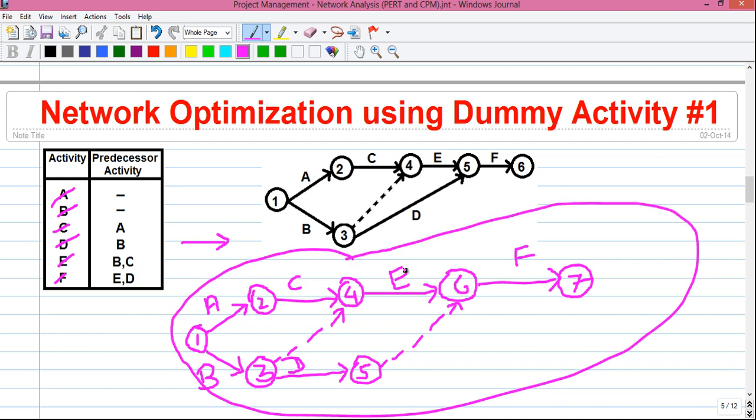Now we will do some optimization to it. Instead of drawing activity D this way at event 5 and then connecting it with dummy activity to event 6. If you draw the activity D straight from this event to directly this event, you can save one dummy activity. Also, you will save one event number. Instead of finishing the network at event 7, you can finish the network at event 6. So by that way, you can optimize your network.